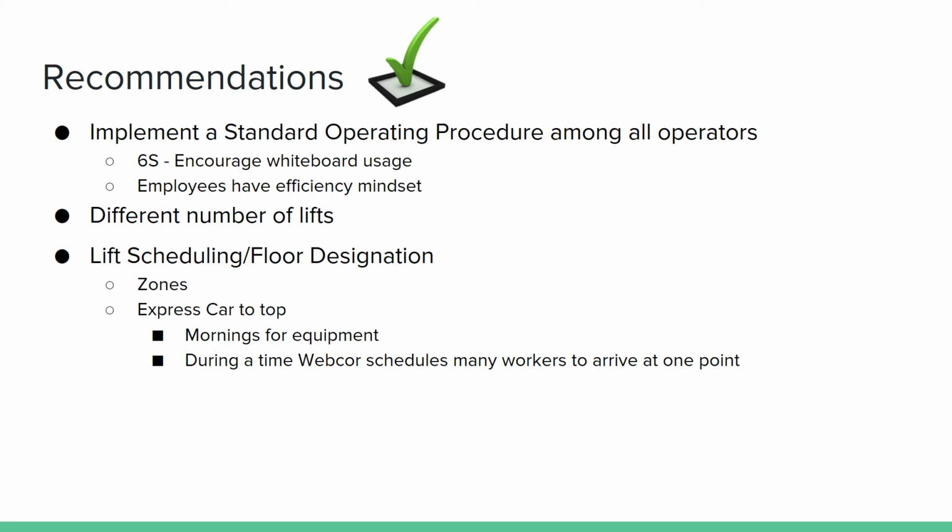In conclusion, we wanted to briefly go over our overall recommendations. We want to propose an SOP to Webcor that highlights the usage of a whiteboard, which will reduce confusion of the operator when determining floor calls. Our procedure will also remind employees to have an efficiency mindset by taking ladders so that they can reduce the wait time for other employees on the lift.